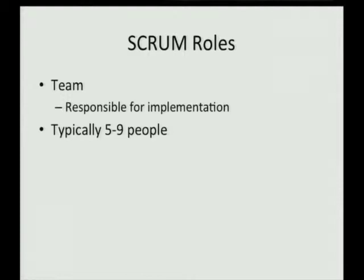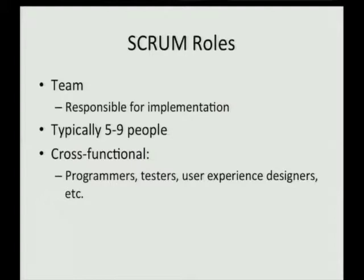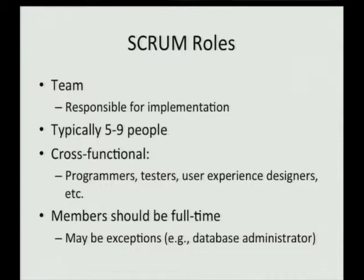The team is responsible for implementation — typically five to nine people. Really important in Scrum is that the team should be multidisciplinary; ideally you should have all the roles required to produce the software. Members should ideally be full-time, but there are exceptions — database administrators, architects, UX and design people can sometimes be part-time.